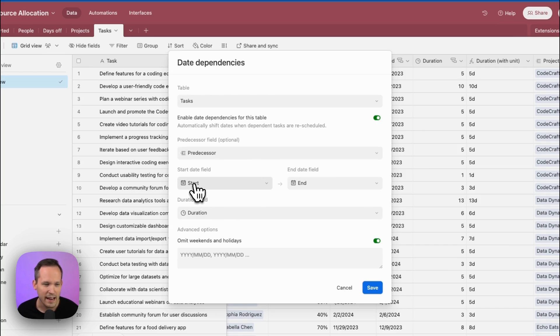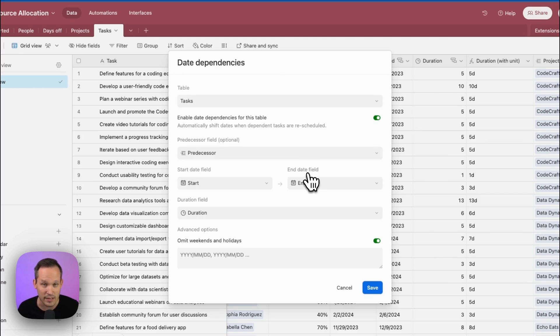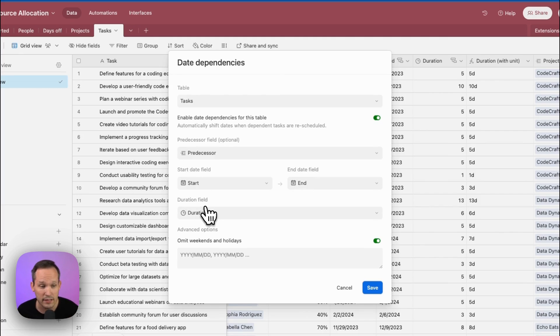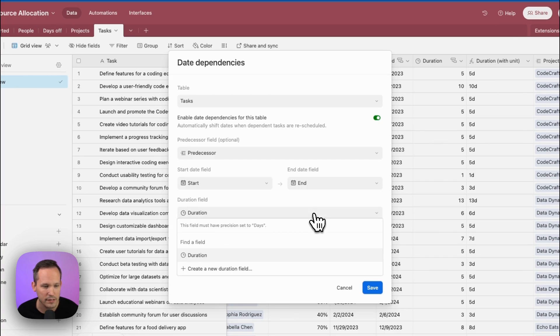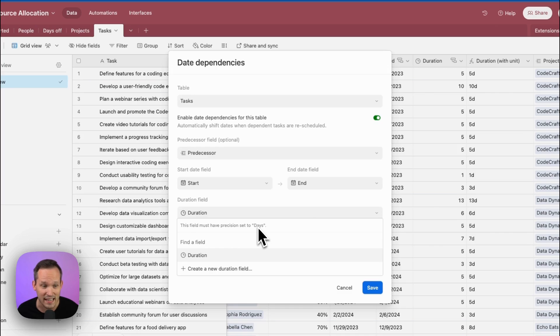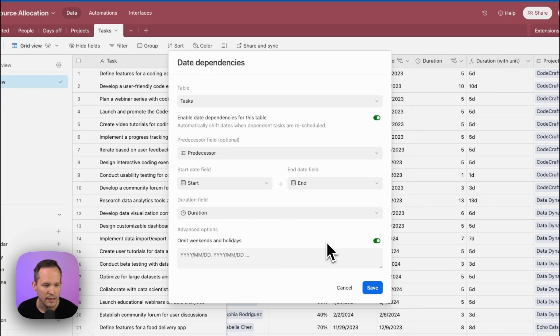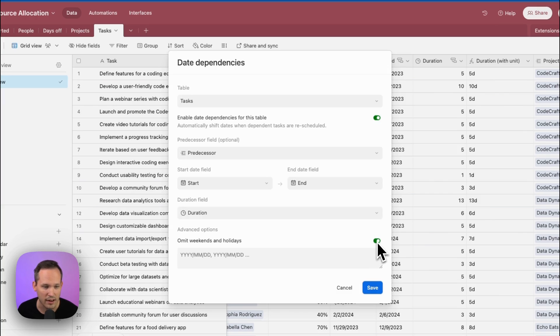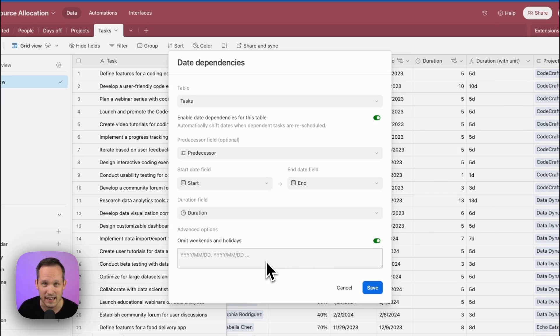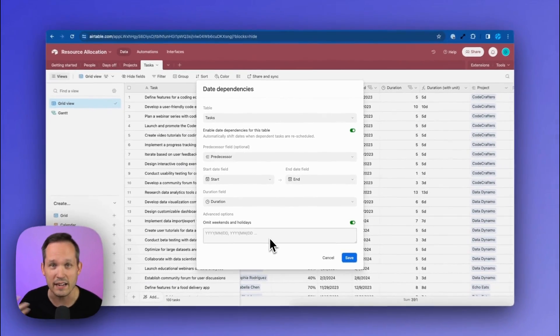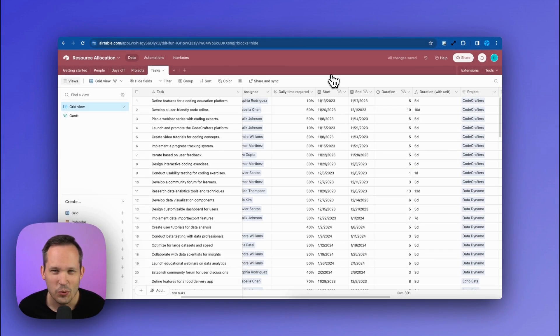Then of course, we need to say what are the start date and the end date so that it knows how to shift those dates appropriately. And then we also have a duration. And it's important when you configure this duration that it needs to be set to a precision of days. So we're not doing this by hours within a day. This needs to be days and not at a more macro level as well. And here we can omit weekends and holidays, you can toggle that on and off. And you can also add a list of specific days that you want to be excluded here.